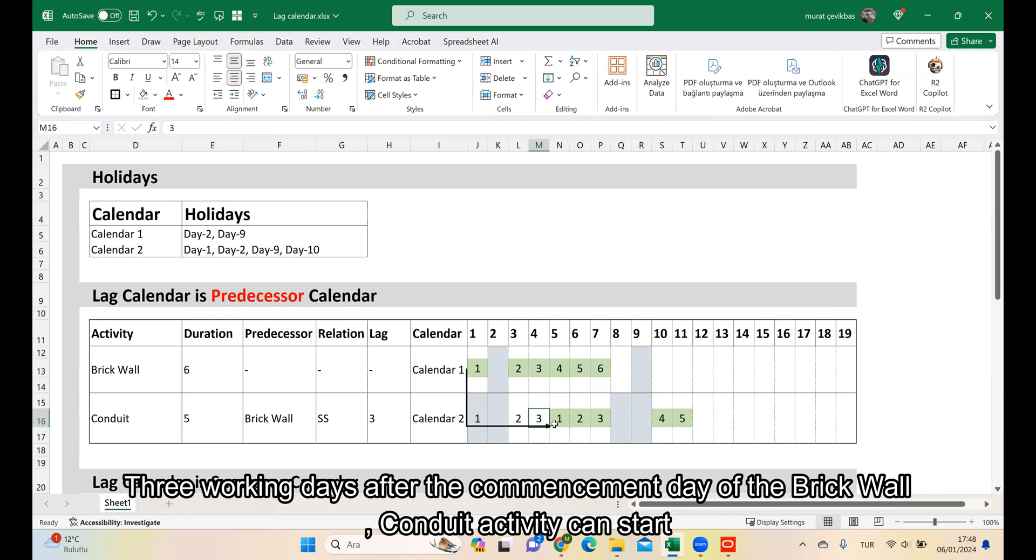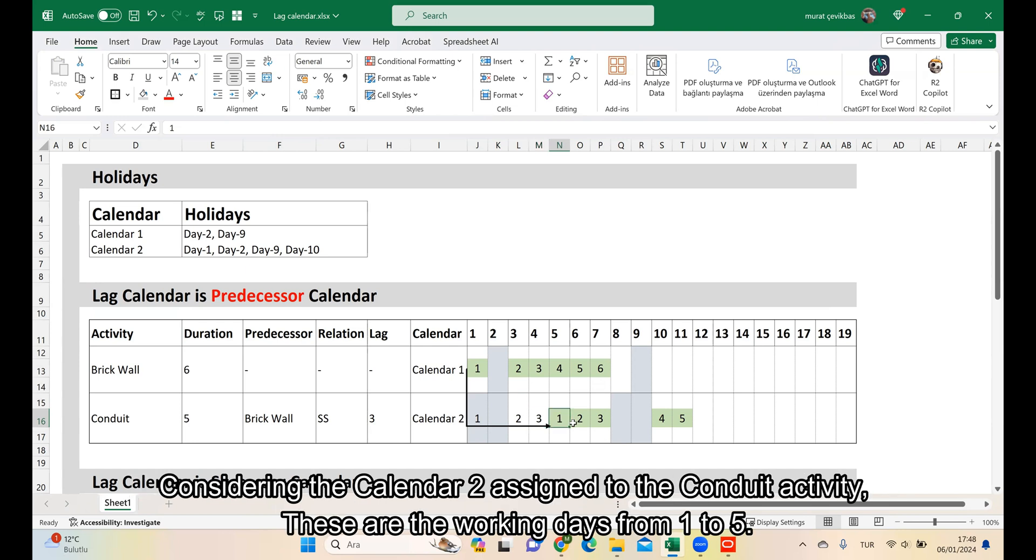3 working days after the commencement day of Recall, the Conduit activity can start. Considering the Calendar 2 assigned to the Conduit activity, these are the working days from 1 to 5.